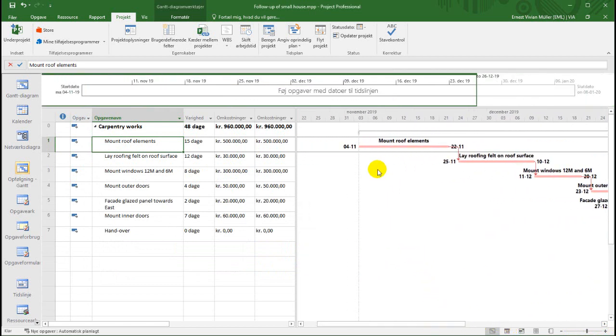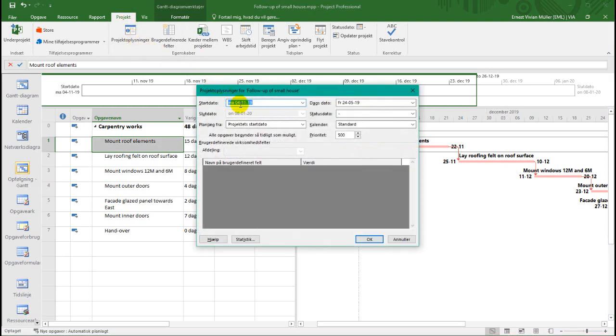We know that the contractor gets paid after 1 month's work is done, or if you use GC 18, we can also choose 14 days. I'm going to use 1 month as an illustration. In order to illustrate when the contractor is paid, I'm going to do a couple of things here. I'm going to go into Project and Project Information, and I'm going to go in here and choose a status date.